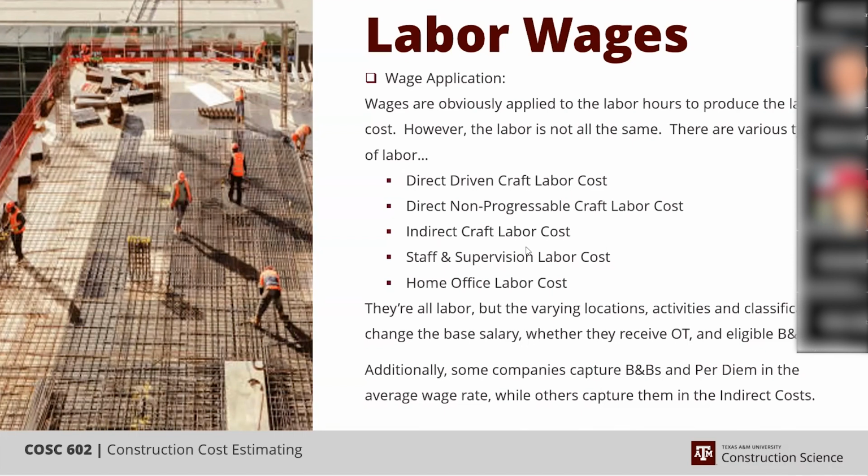So then my question, were they able to invoice the client for that? Yeah, they were. But it depends upon what the contract was. In other words, if it was a lump sum job, they theoretically were billing the owner for it because they were built into the lump sum cost.